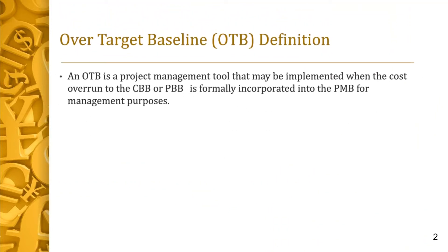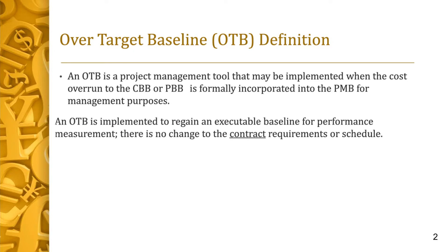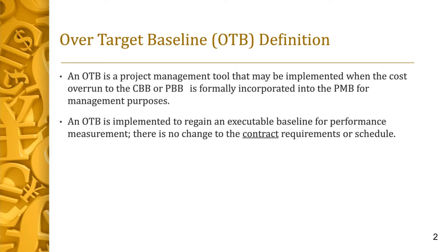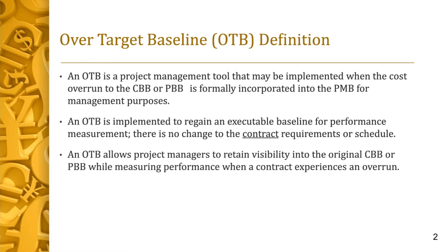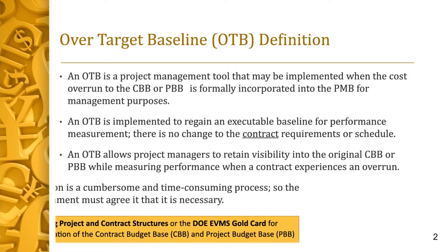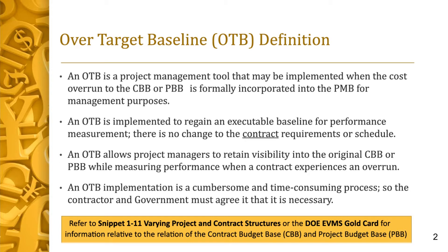An OTB is a project management tool that may be implemented when the cost overrun to the Contract Budget Base (CBB) or Project Budget Base (PBB) is formally incorporated into the Performance Management Baseline (PMB) for management purposes. An OTB is implemented to regain an executable baseline for performance measurement. There is no change to the contract requirements or schedule. The CBB or PBB does not change when an OTB is implemented. An OTB allows project managers to retain visibility into the original CBB or PBB while measuring performance when a contract experiences an overrun. The implementation of an OTB should not be taken lightly, as it is not uncommon for the entire process to take up to six months, which may be too long of a period without basic cost reporting, depending on the number of months or years remaining on the project.